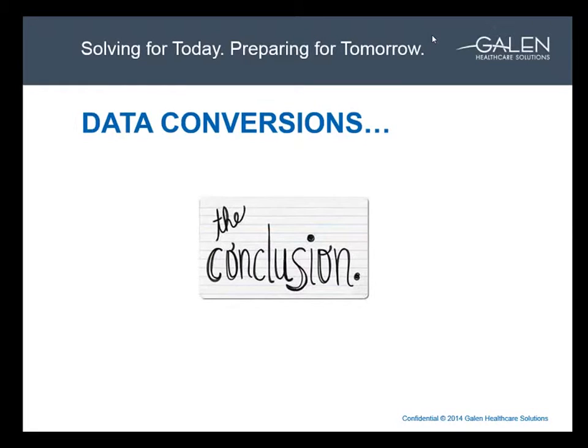Usually they're set up where, let's say you're doing a colonoscopy, you'd want to make sure whatever procedure we mapped colonoscopy to in the target system will actually trigger that health maintenance alert. If it's part of the scope, we'll definitely make sure this is part of testing, definitely during full-scale or large-scale testing, and also make sure that during workflow testing all the data triggers the right health maintenance alert.